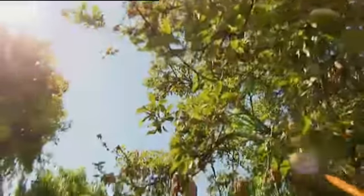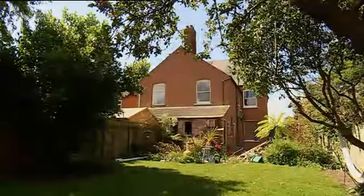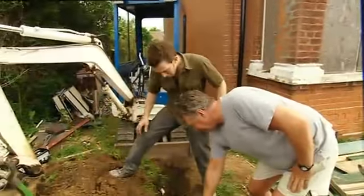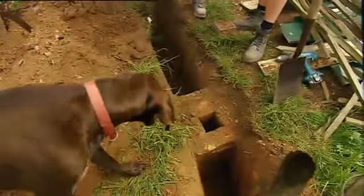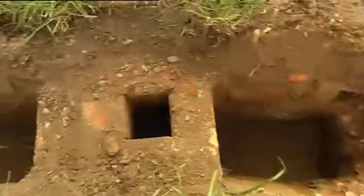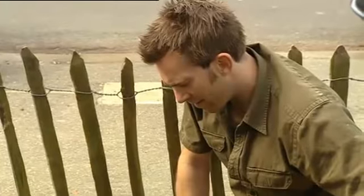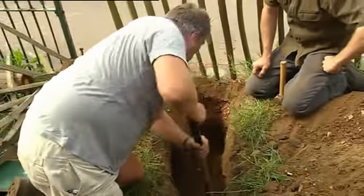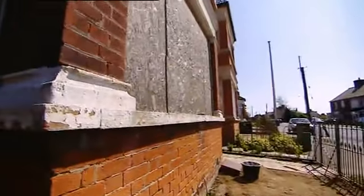Great. Making money on side deals like this can seem a godsend, but you should seal the deal in writing. Make sure you don't accept responsibility for any maintenance work and that the position of the pipe is clearly marked on your plans. For about £200, a solicitor will draw up an agreement, and that's money well spent. Mike is still £2.5 grand better off. Now I hope that they spend it in the right places, like the second bathroom, and getting some help to get this place done.